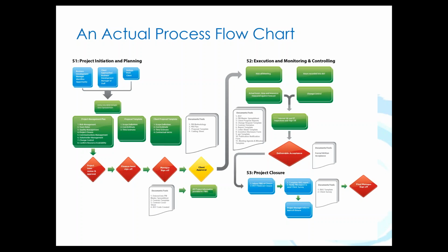And you'll see there's some suggested documents and tools there that have to be completed along the way. Once it's got client approval, it moves into execution and monitoring and controlling, they rolled those two processes together because that suited their organizational culture. And there are the things that happen during there and also the documents and tools that are available. Now, every one of these links back to a document that's available on their intranet. It's very easy to discover, very easy to get hold of. Then the process ends with project closure. You've got formal closure, you've got customer surveys, things like that, and the final manager sign-off.